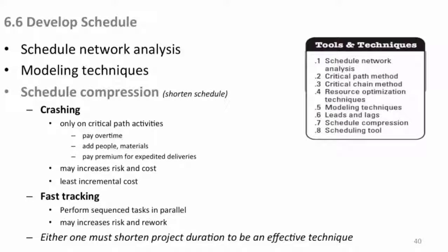So only on the critical path, and you may want to pay overtime for people to work faster, well, not necessarily faster, but work more on that day in that duration time period, remember, per day or per week or whatever, to bring in the schedule. You may add people and add extra materials to accomplish more work within the same period of time.